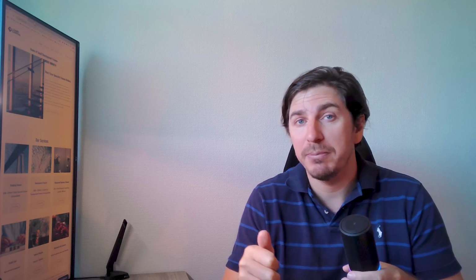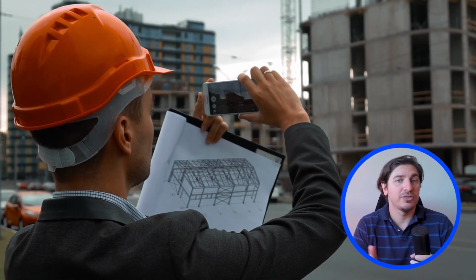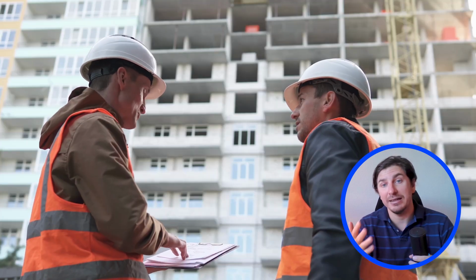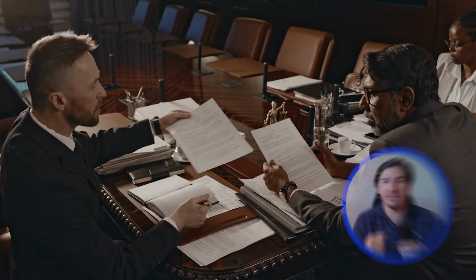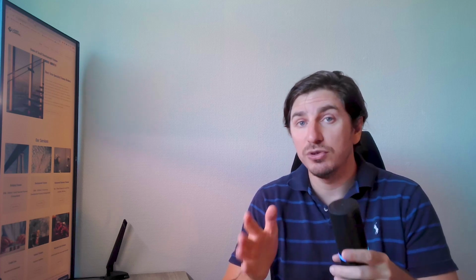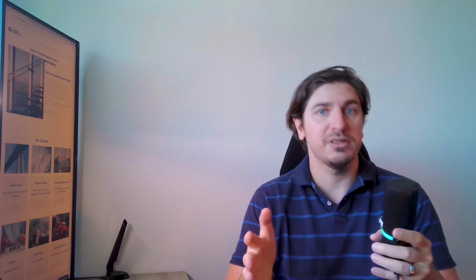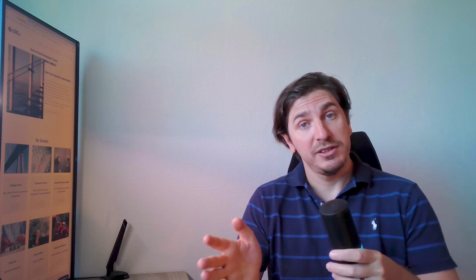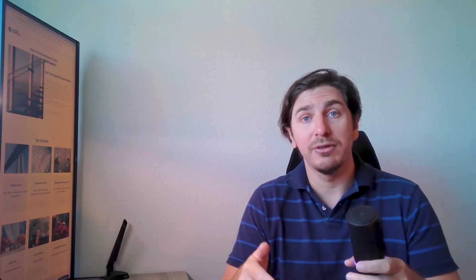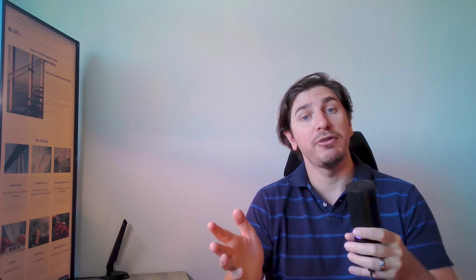Then you've got the actual professional fees. This is one that most people severely underestimate. This includes things like architect's fees, quantity surveyor fees, project managers, valuation fees, and the aforementioned solicitor fees. They can really add up, and depending on the size of your build, it can eat into a huge chunk of your actual profits, up to sort of 10-15%. For example, quantity surveyors, you're looking at typically £1,000 to £2,000 for their initial visit on a really small project, so one ground up build. Then for every single drawdown, it can be another £1,000, so that just very quickly can add up.